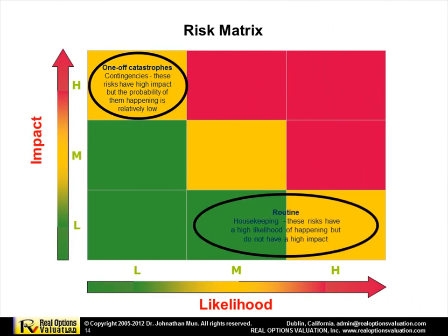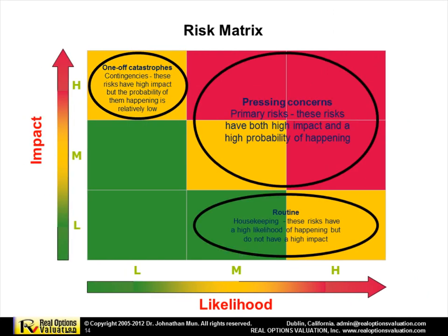Now, traditional risk methodologies would use something like a risk matrix. On the y-axis, you have impact: high, medium, low. Impact in terms of dollars or strategic impact. And then likelihood would be like probability: high, medium, low. So if it's high and high, high impact, high likelihood, it would be red. And then you have yellow in the middle region and then green, for example.